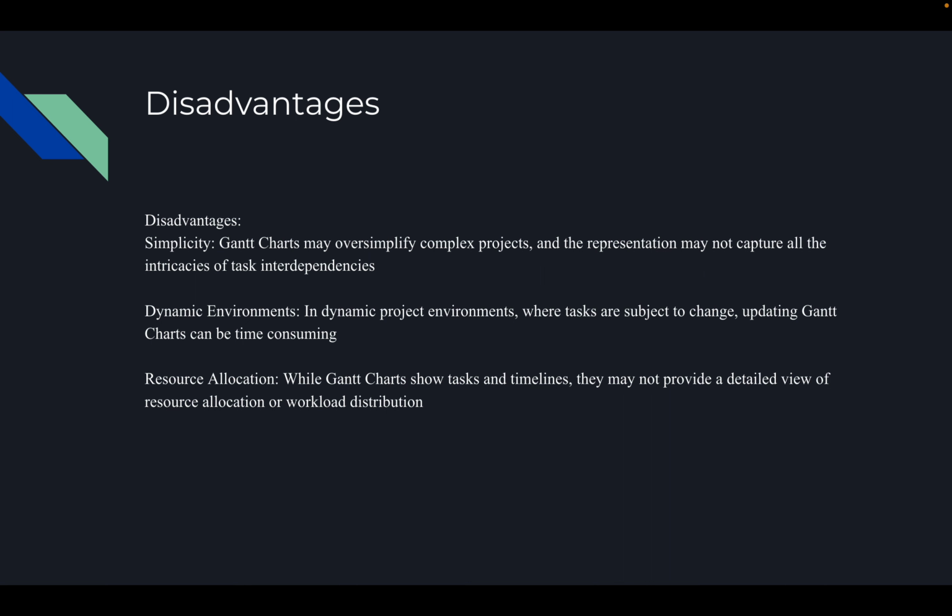Dynamic environments can be where tasks are subject to change, and updating Gantt charts can be time consuming as well. And then lastly, while Gantt charts show tasks and timelines, they may not provide a detailed view of resource allocation or how much time it's going to take to do those tasks and then distribute them.